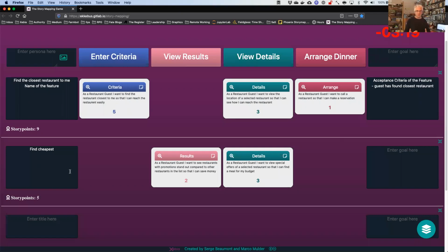Yes, we are definitely dependent, and it's also one of the things I would really like for a tool to have: a mature way of dealing with hierarchy. That's actually why I'm happy that Azure DevOps already out of the box gives you 3 levels, which is actually perfect, because the lowest level is these stories. The next level up is a slice, and you could say the full epic would be a whole story map. So that's actually pretty nice.